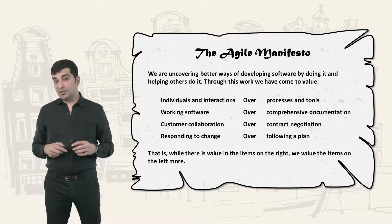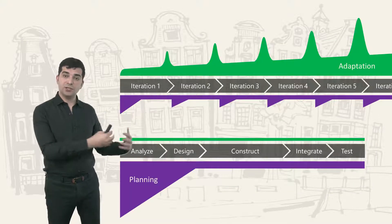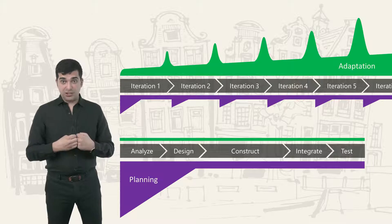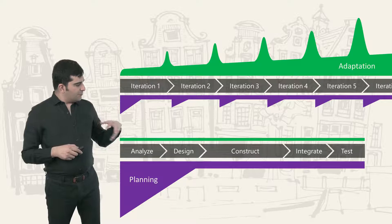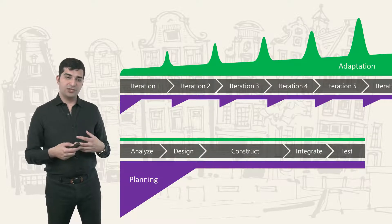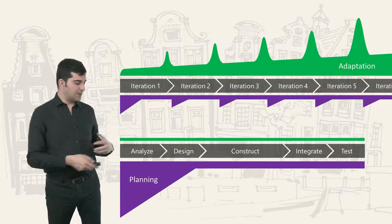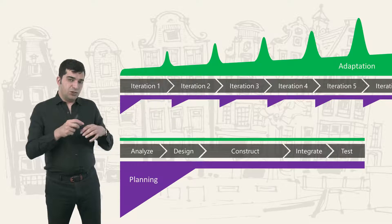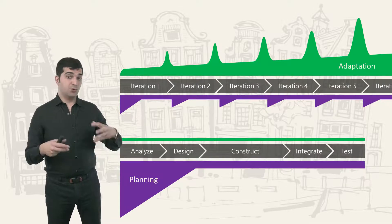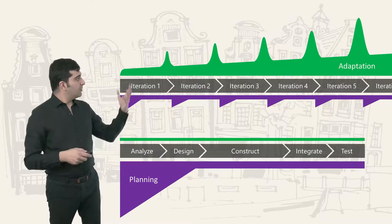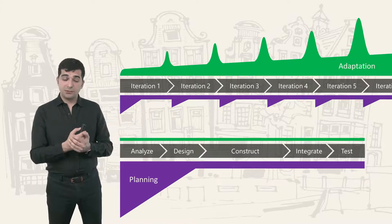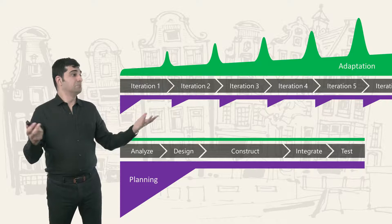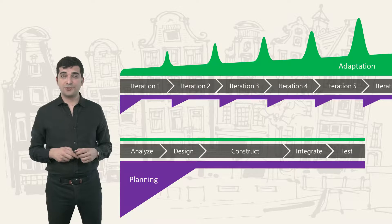The last value is responding to change over following a plan. In a predictive system, we have a comprehensive upfront plan — our best way to do the project based on initial understanding. When a change is needed, it's usually more expensive because we have to change plans and designs, and predictive systems tend to have more dependencies, meaning more things to fix. In an adaptive project, we don't have that upfront plan, so new ideas come in — it's even difficult to call them changes — and the customers like it.